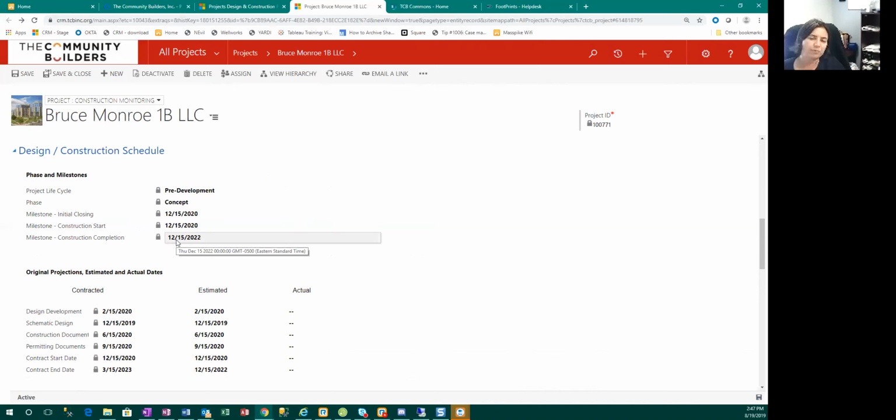Shouldn't, Jeff, maybe it's too much, but shouldn't we track the substantial completion or the place in service? Because if I learned anything, it's not as important when the contract finishes, but those subsequent milestones that you need to hit, like a permanent CO to get the developer fee in. Unless you want us to track that in the pinch point.